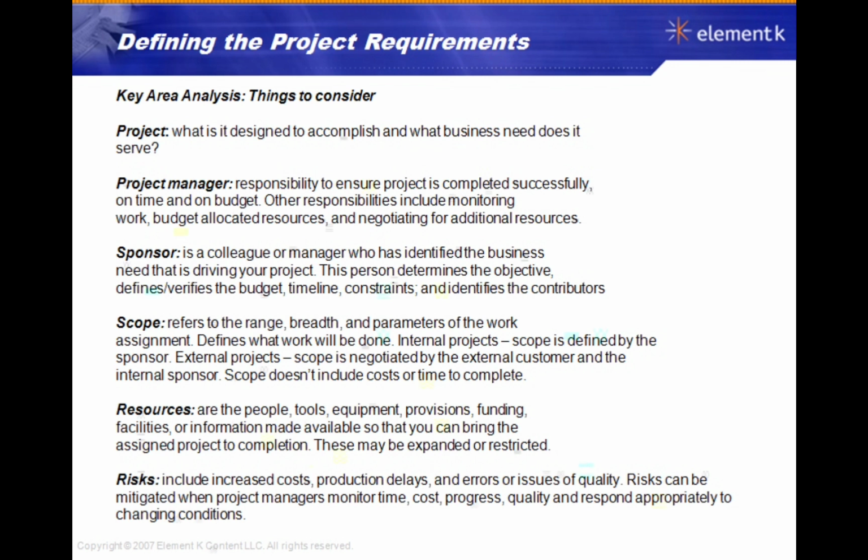Now, the sponsor. The sponsor is a colleague or a manager who has basically identified the business need that is driving your project. This person actually determines the objective, they define and verify the budget, the timeline, any constraints, and also who the contributors are going to be. So sometimes you actually don't even have a choice of the contributors that are going to be supporting you on the project. Those contributors are already provided for you, and then you've got to find a way to assign the tasks according to their expertise.